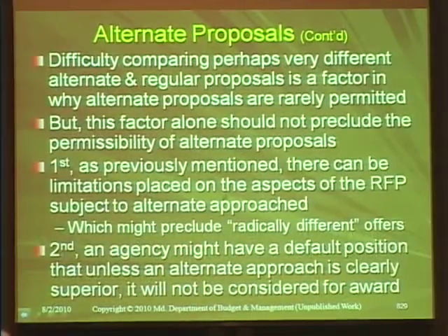Difficulty comparing perhaps very different alternate and regular proposals is a factor in why alternate proposals are rarely permitted, but this factor alone should not preclude the possibility of alternate proposals. First, as previously mentioned, there can be limitations upon the aspects of the RFP subject to alternate, and second, an agency might have a default position that unless an alternate proposal is clearly superior, it will not be considered for an award.